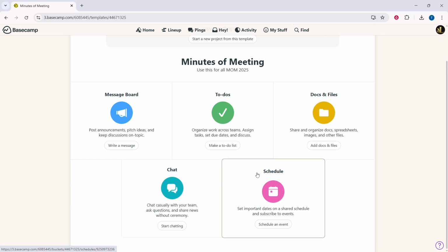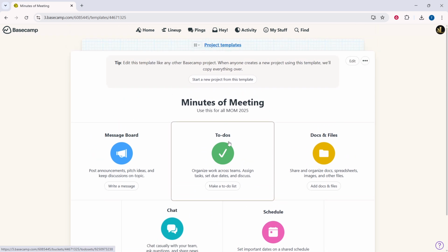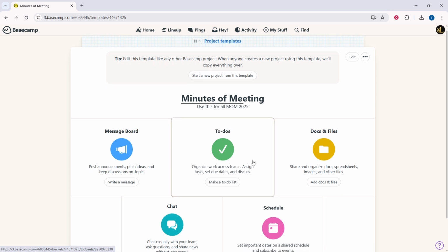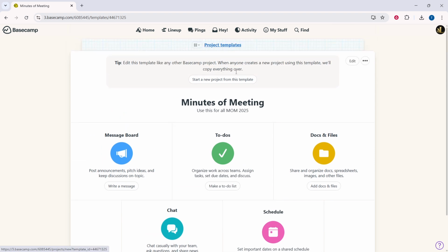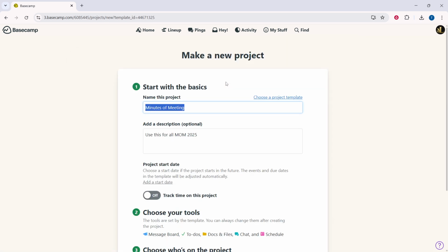Now we get into the details with to-do lists. Create your lists and add individual items that will form the foundation of your project planning. For each to-do item, you have the option to attach relevant files or necessary documentation. An important tip here is to set relative due dates, which means assigning timelines such as Week 1, Kickoff, or Week 2, Design Review, rather than fixed calendar dates. This allows flexibility and adaptability for whenever the template is used.